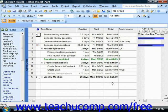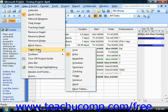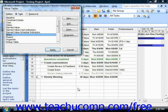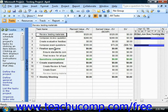Once you've accomplished these tasks, you can view the earned value schedule indicators for your project by selecting View from the menu bar, rolling down to Table and then the current table name, and then choosing More Tables from the menu. In the More Tables dialog box, select the Earned Value Schedule Indicators choice and then click the Apply button to display the values in the Gantt chart view.